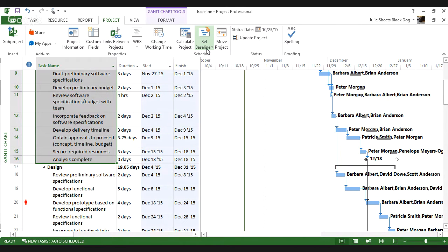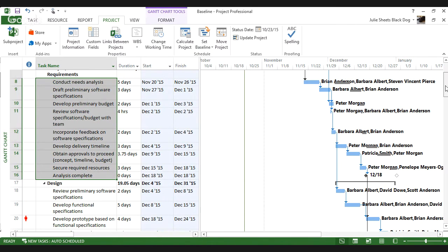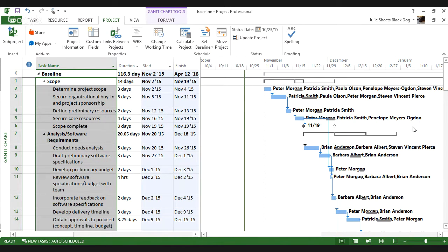They have some issues with control, and some issues making sure the priorities are clearly associated. So instead of destroying my original baseline, I'm going to take the baseline for my tasks that I just saved a minute ago, copy it into a spare baseline, and then be able to overwrite the original baseline.